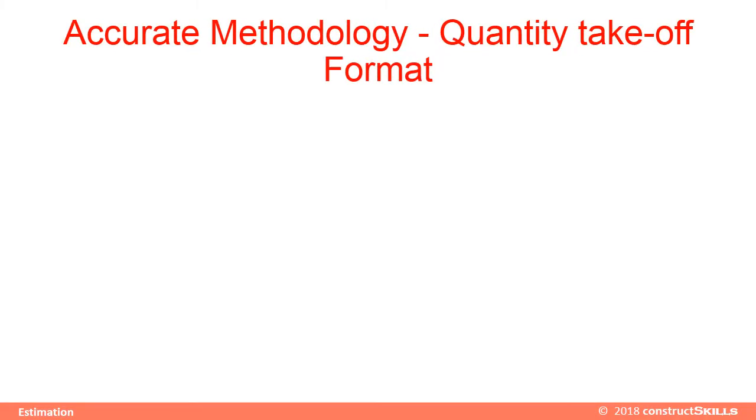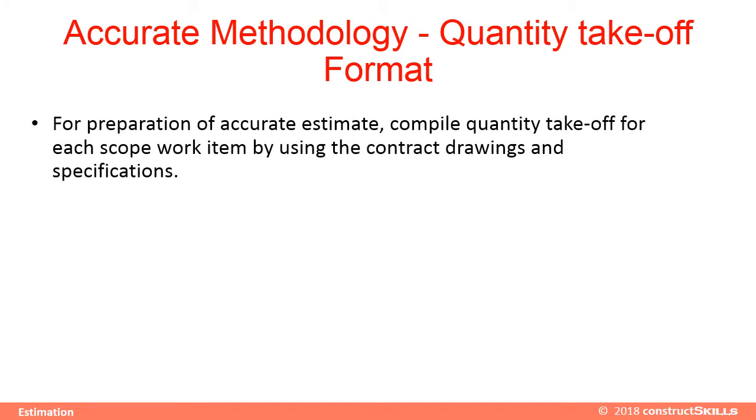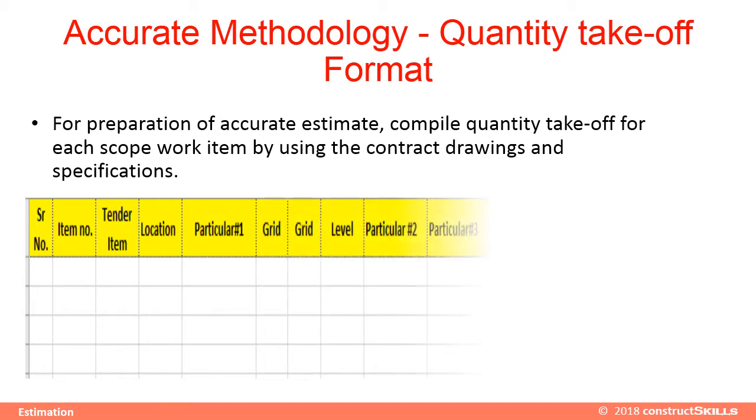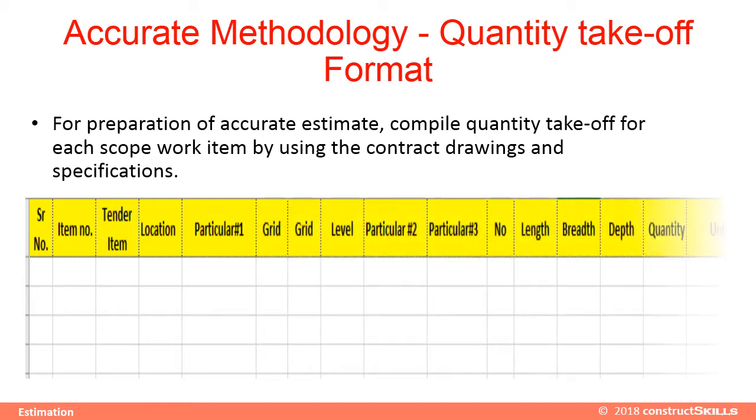Quantity takeoff format. For preparation of an accurate estimate, compile a quantity takeoff for each scope work item by using the contract drawings and specifications. The table shows a quantity takeoff format. As seen, various parameters need to be recorded to get a detailed estimate.